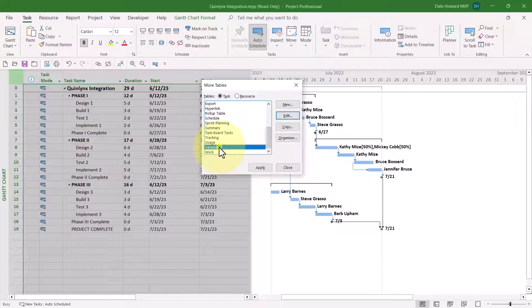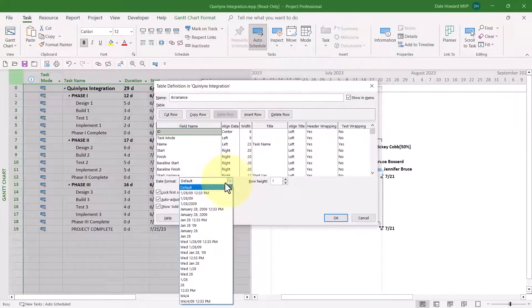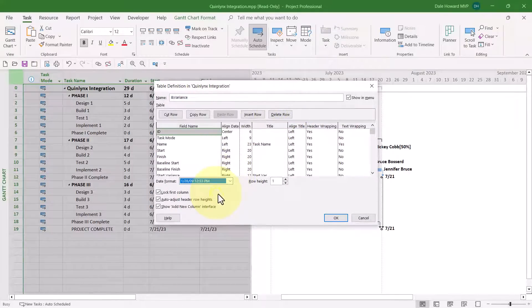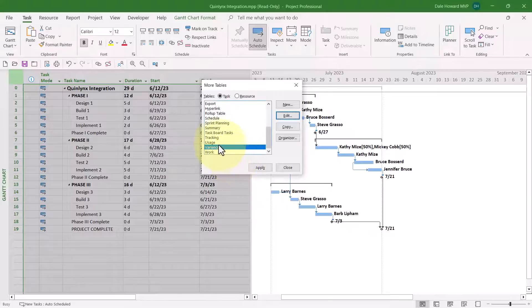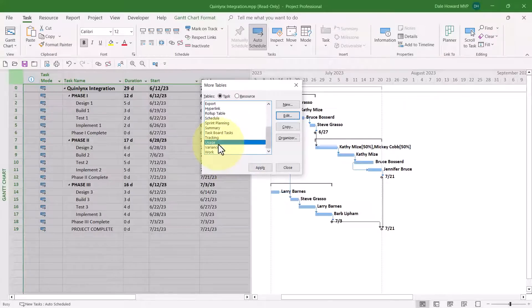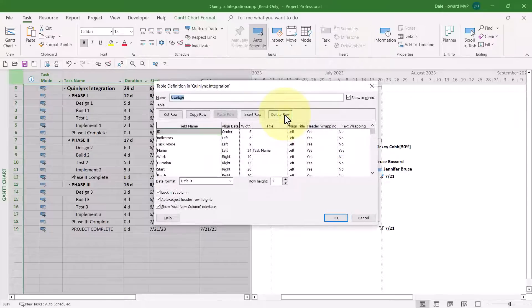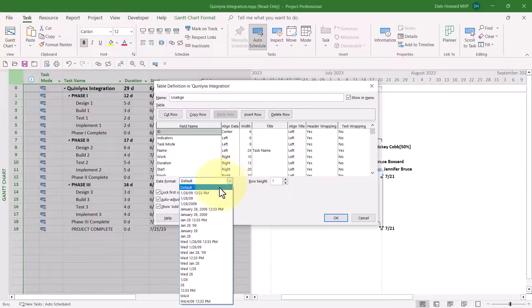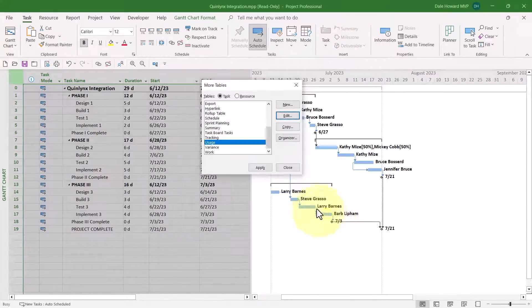One of those is called the Variance table. So I'll select Variance. Click Edit. Change the Date Format. Another one I recommend you change is the Usage table. That's the table that is displayed in the Task Usage view. So let's go ahead and edit that. And again, we'll change to the Date and Time format.